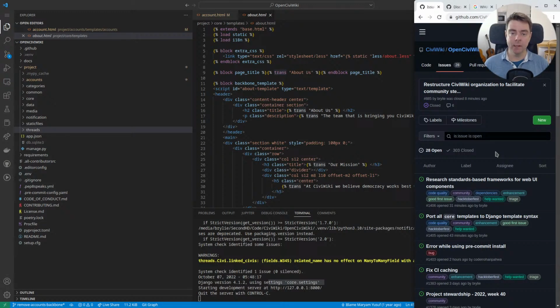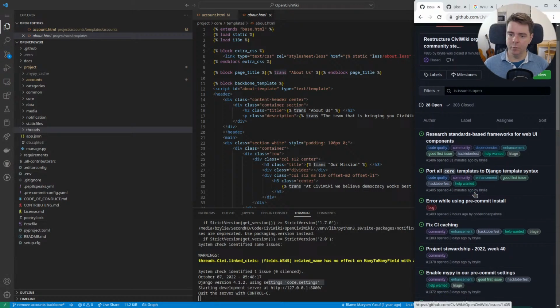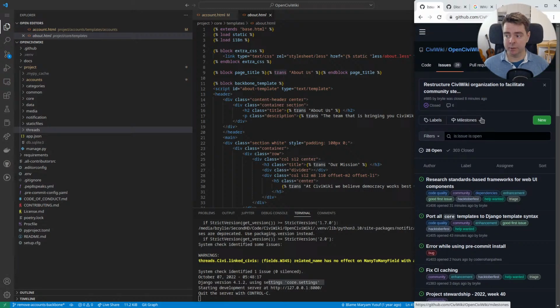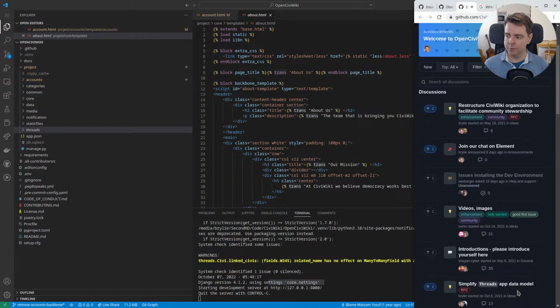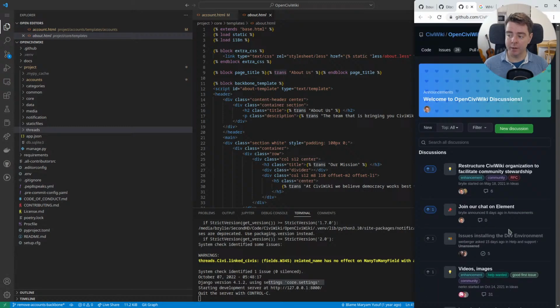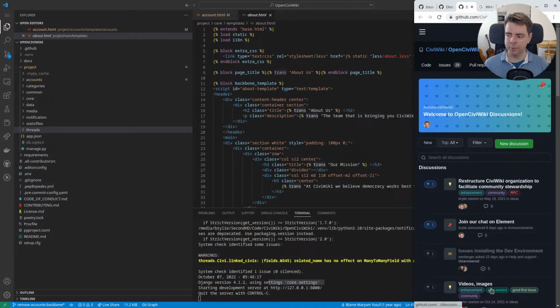In today's live code hangout, we did some backlog gardening or project management, reducing our open issues down to 28 by closing some old issues, creating a couple of new issues, and moving some issues over to discussions. We're using both discussions and issues here on GitHub. If you've got an idea and we're not ready to quite work on it, we're still trying to figure out if it's a good idea, we'll typically move it here to discussions.